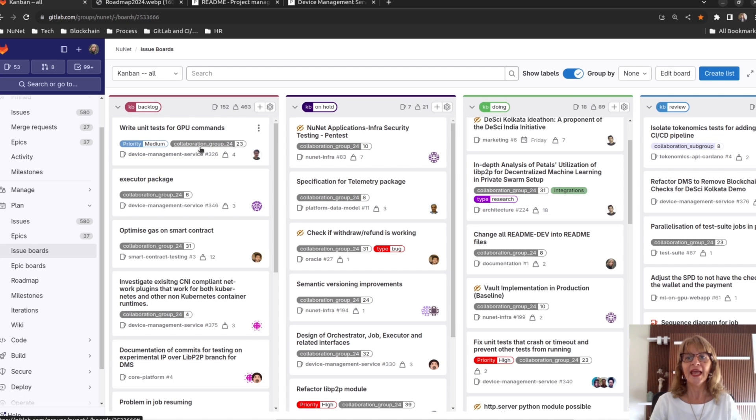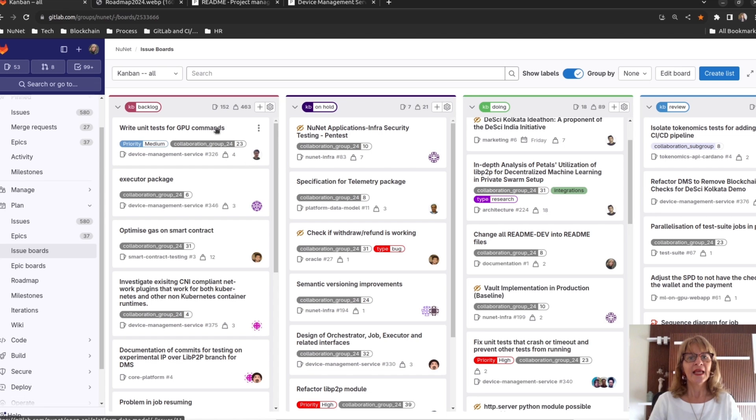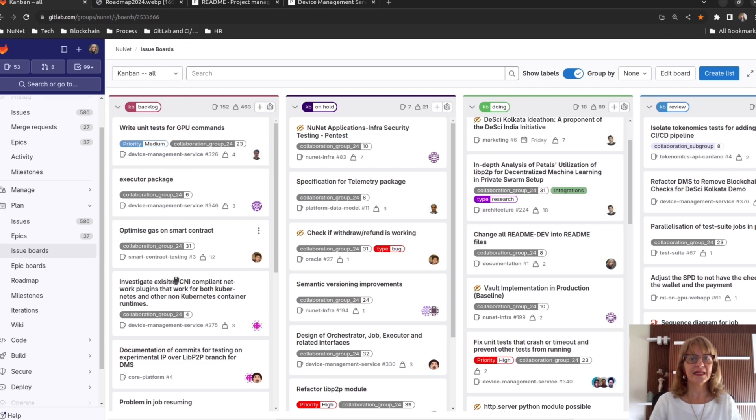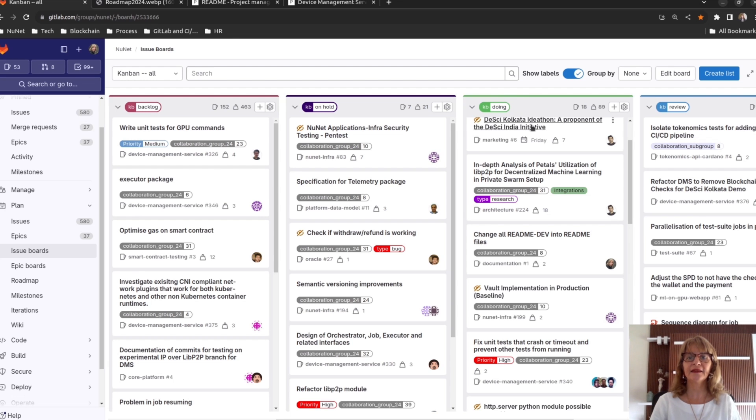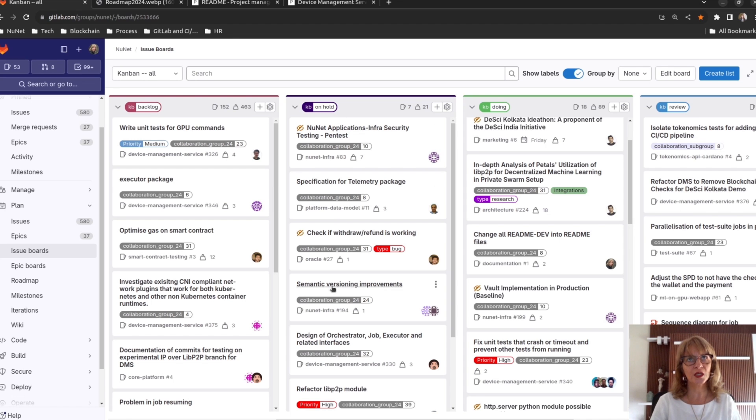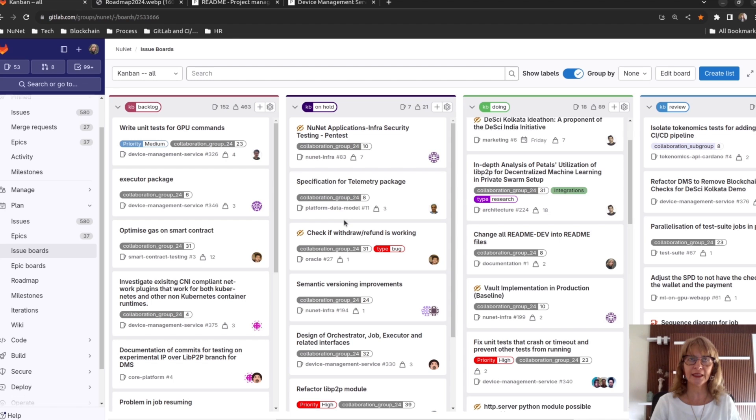At Newnet, we use this Kanban board and it's in our GitLab space and public. Here, you can see tasks in the backlog, tasks that the team is currently working on and tasks in review. The column on hold helps us to see the bottlenecks so that we can prioritize unblocking them.